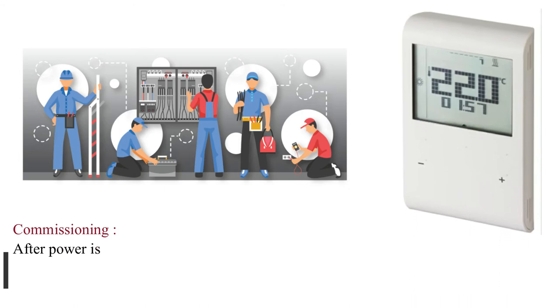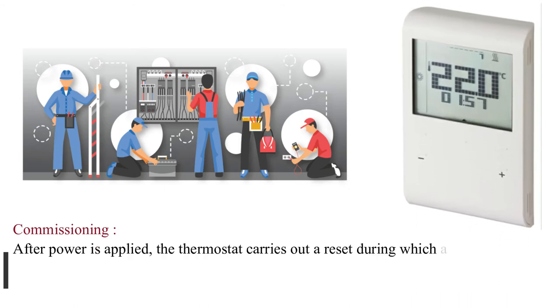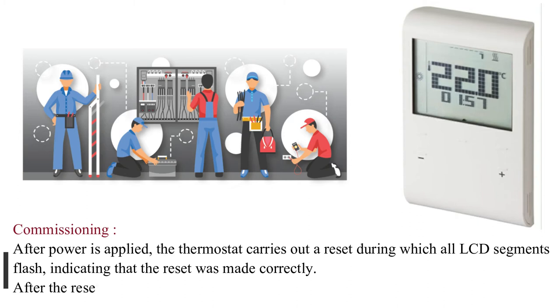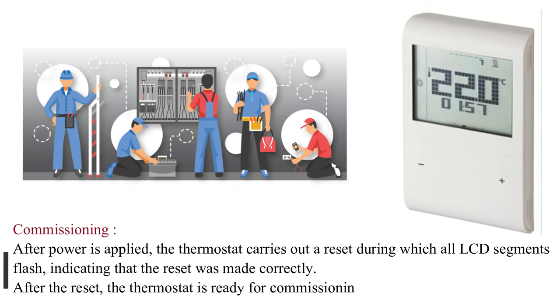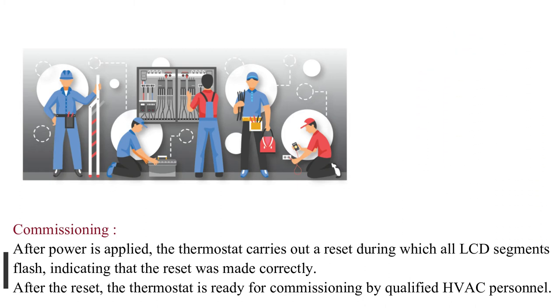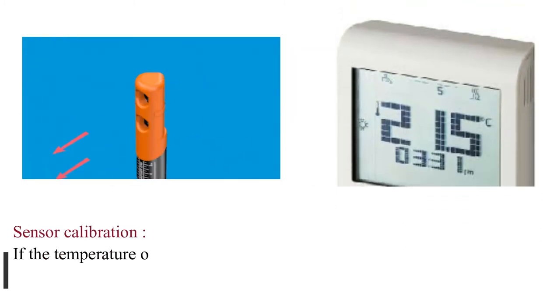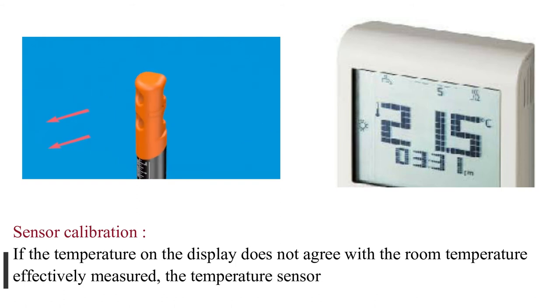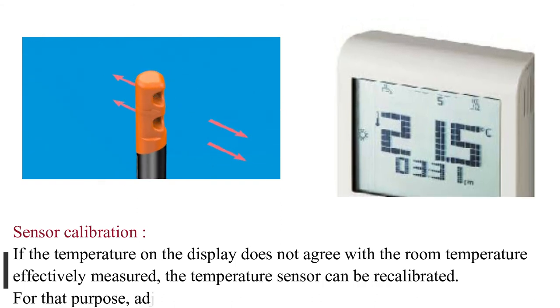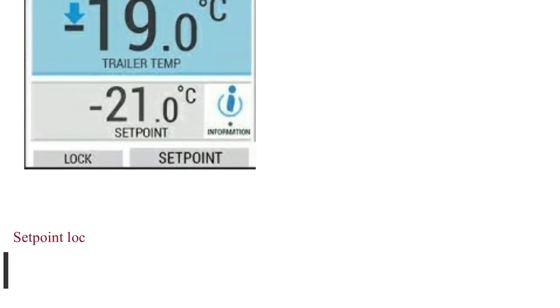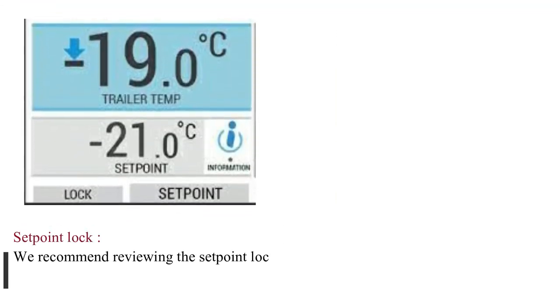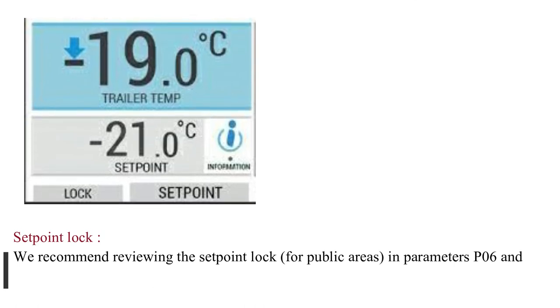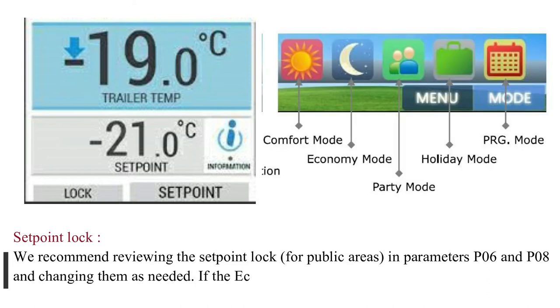Commissioning: After power is applied, the thermostat carries out a reset during which all LCD segments flash, indicating that the reset was made correctly. After the reset, the thermostat is ready for commissioning by qualified HVAC personnel. Sensor calibration: If the temperature on the display does not agree with the room temperature effectively measured, the temperature sensor can be recalibrated by adjusting parameter P04. Setpoint lock: We recommend reviewing the setpoint lock for public areas in parameters P06 and P08. If the economy setpoint is locked, then the comfort temperature setpoint cannot be set lower than the locked economy setpoint.